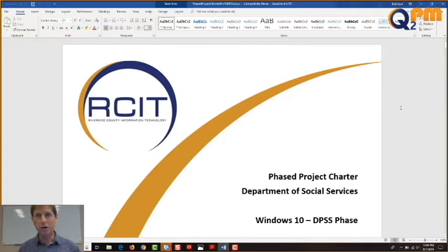The Phased Project Charter, again, is our contract for the project. 3 steps: business case, project proposal, project plan. The business case is the problem. The proposal lists the one or more options. And the plan is how we're going to actually execute the selected option.